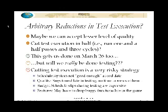You're going to have a schedule slip anyway, probably, because as I said, the system's not going to be good enough to ship by the end. And usually, a schedule slip during the system test period is about the most expensive kind of schedule slip you can get, because generally the burn rate on the project, the rate at which you're going through money, is maximum during the system test period. So it's the exact wrong time to have a schedule slip.